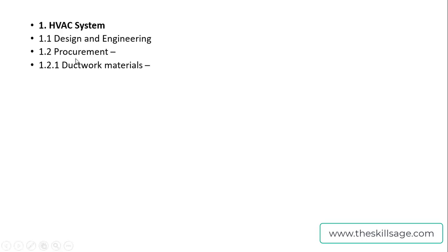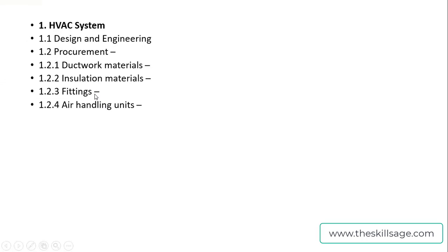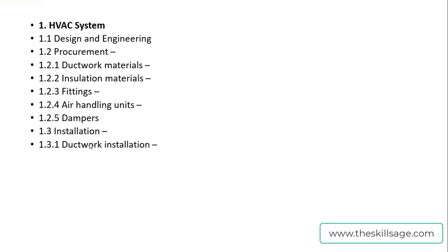Procurement is long lead items and bulk items. But what are the items? Duct material, insulation materials, and fittings are required. So these are the materials we need to arrange. Once design is done and the material takeoff (MTO) is done, we have to plan for the procurement. And the third part, this is 1.3, the third WBS, the first, second, third installation.